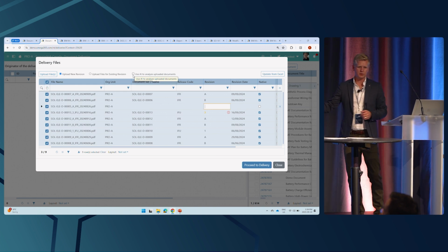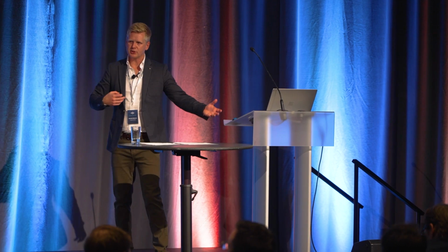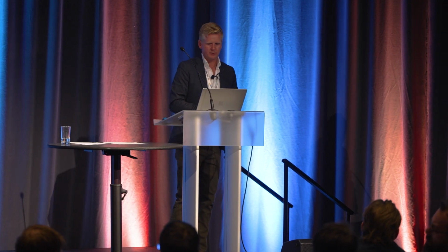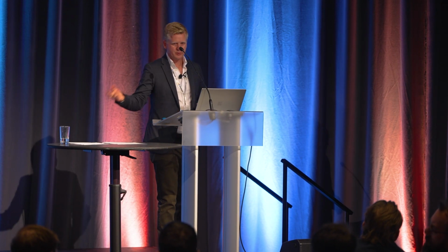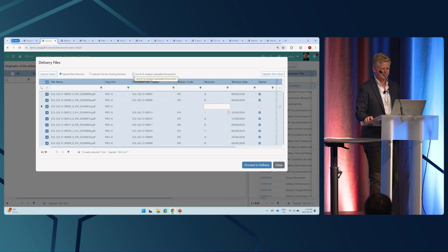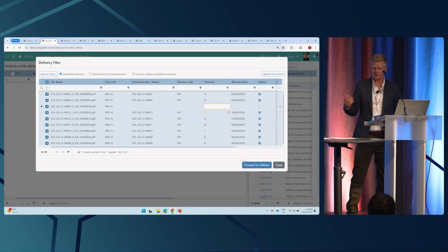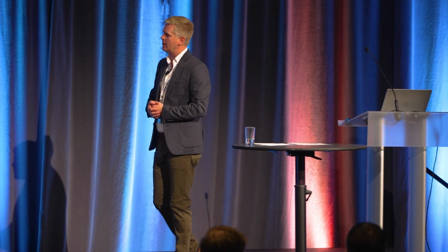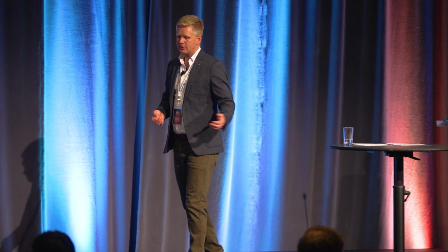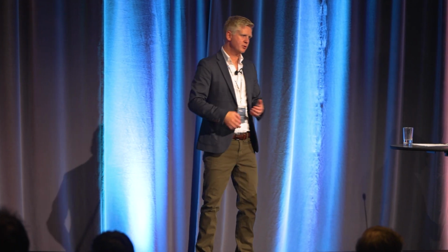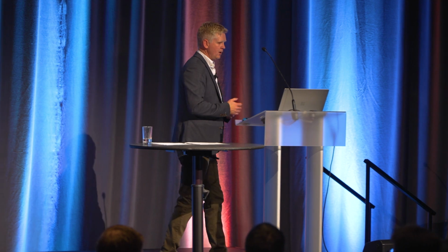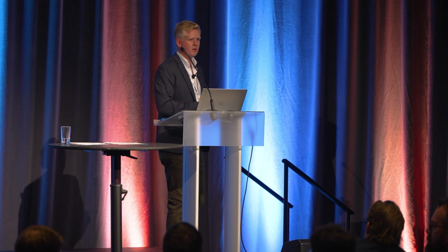and we'll do the same procedure we saw earlier, where it just sucks out the information directly from the documents and puts it in there to validate. And you can also do this in batches later on. Then you proceed to the delivery if you want to approve, like the EPC will proceed to delivery, and then it's up to the project: should this go directly in the document register, or should it go to the document controller for some extra validation? It's up to you to define on the contractor.